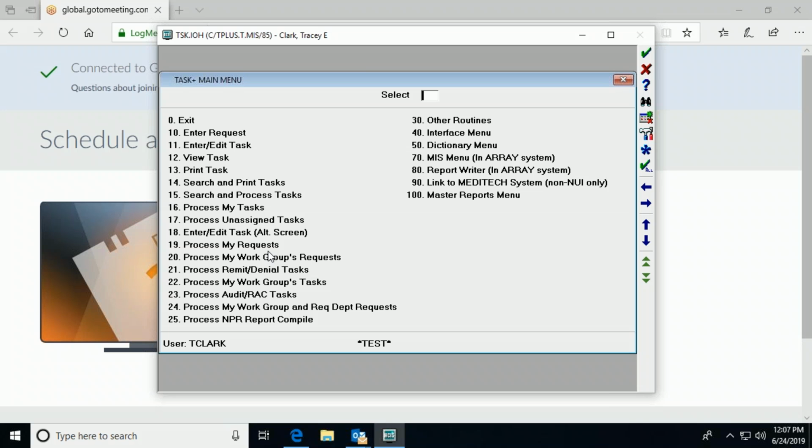But you might encounter a situation where something isn't working correctly in your module that has nothing to do with the DTS you're testing. In that case, I think Tracy is saying that you'll want to create a task. Going through the workflow testing, you find something odd, and we need to question it or talk to Meditech about it, and it wasn't something you were working on as a task, you can create one so that we can track that problem.